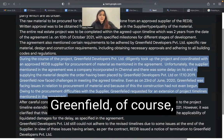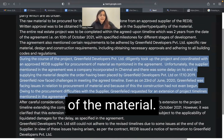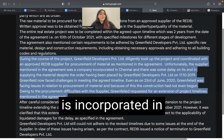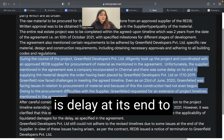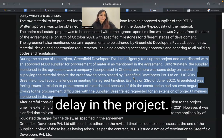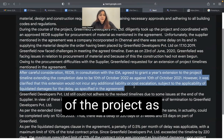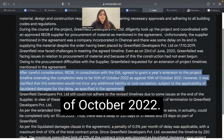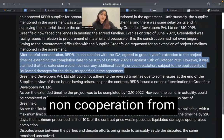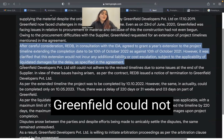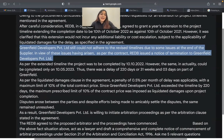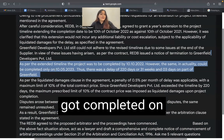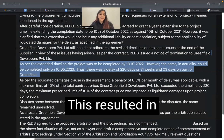During the project, Greenfield coordinated with the suppliers for procurement of material. However, there was non-cooperation on part of suppliers — the supplier, incorporated in Chennai, caused delays in supplying material, which ultimately led to delay in the project. They agreed to extend the timeline from October 2021 to 10th October 2022. However, because of continued non-cooperation from suppliers and other parties involved, Greenfield could not adhere to the revised timeline either. Instead, the project was completed on 10th May 2023.